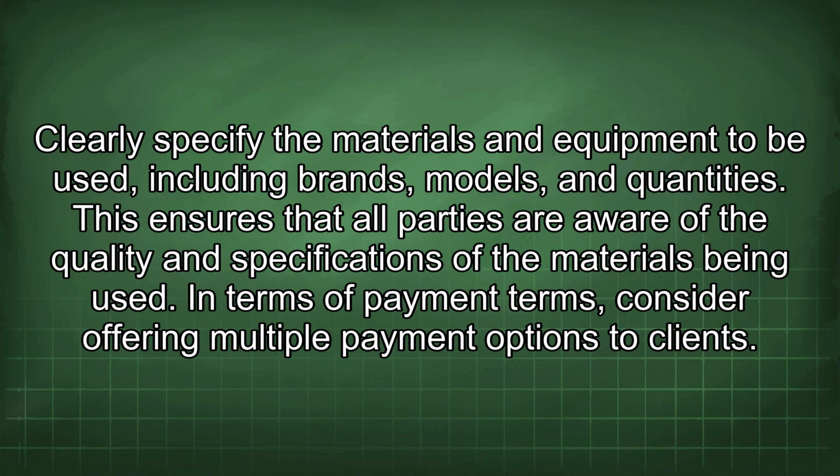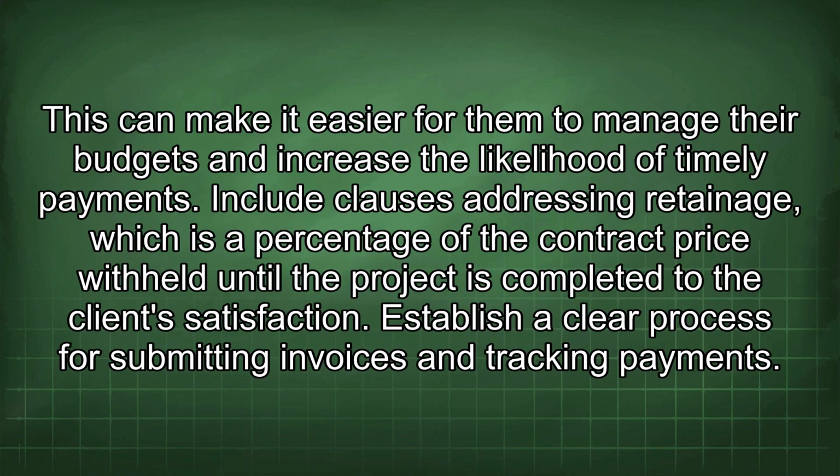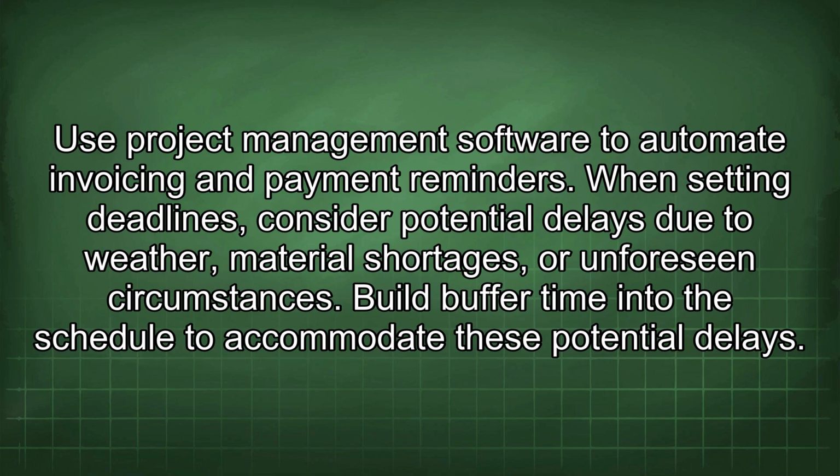In terms of payment terms, consider offering multiple payment options to clients. This can make it easier for them to manage their budgets and increase the likelihood of timely payments. Include clauses addressing retainage, which is a percentage of the contract price withheld until the project is completed to the client's satisfaction. Establish a clear process for submitting invoices and tracking payments. Use project management software to automate invoicing and payment reminders.